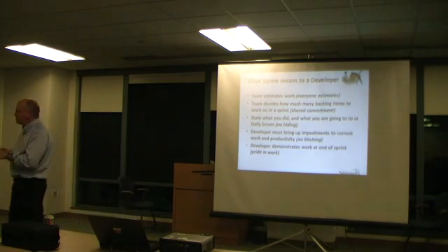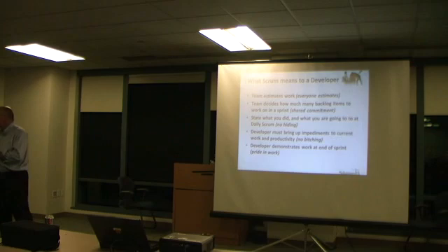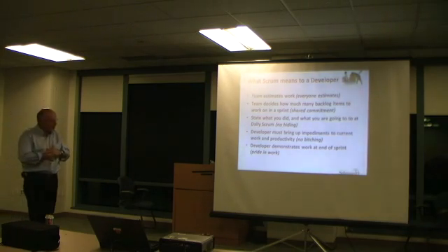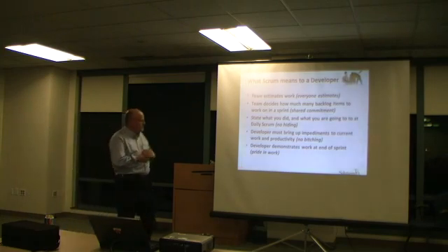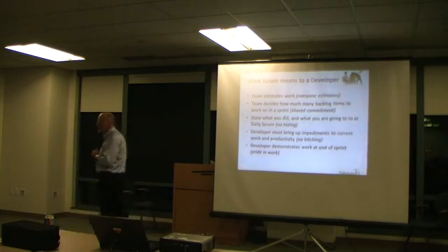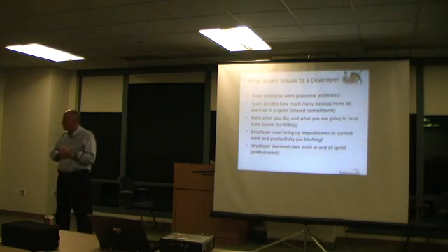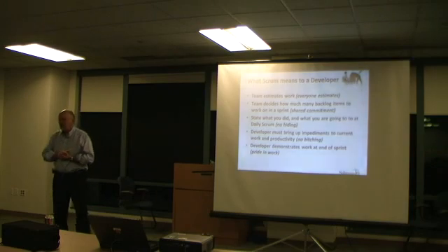Yeah, so one of the things that we do quite frequently is we have the Scrum Master run the 5-minute meeting, and he's basically going over the task list we have on a wiki page or something. Yep. And he's walking down a task list, he's like, well, okay, I did this. And if someone wants to talk about something more, if they take more than 30 seconds or more than a minute, he's like, okay, stop. We write it down on the whiteboard that we're gonna have a discussion about this as soon as we're done. We finish the meeting, and then it's like, okay, we're done with the meeting, and anybody who's interested in this particular topic, stay. Yeah, that's a good one we do too.